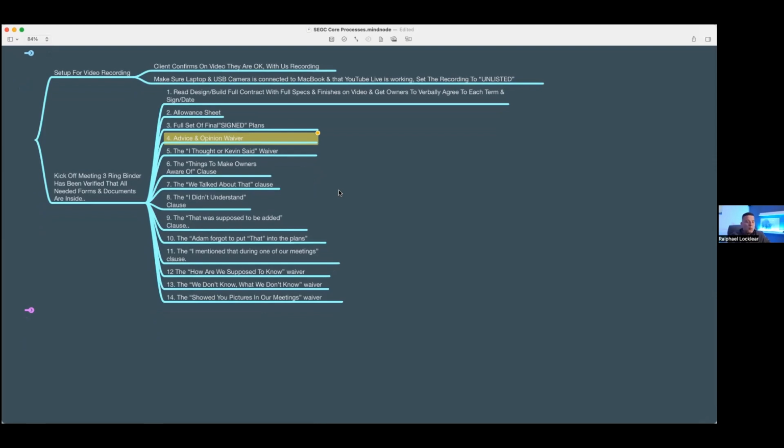Well, guess what? We're a believer in paying for our lessons. We paid that cost of tuition, but now we go over this with clients and talk about it. They agree that if they want advice and opinions from us, ultimately they're responsible. We're not responsible for expectation misalignment with an advice or opinion we've given.